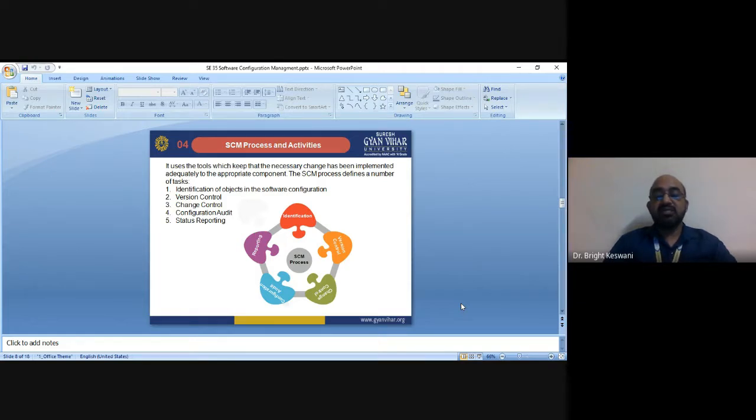SCI, as I earlier said, software configuration items added to the SCM are things such as tools, designs, documents, requirement documents, etc. And the SCI that are identified determine the baselines that are associated with the project. The number and types of baselines will depend upon the form, and only authorized changes can be made to the baseline, and all changes are recorded in detail until such time as a new baseline is generated.